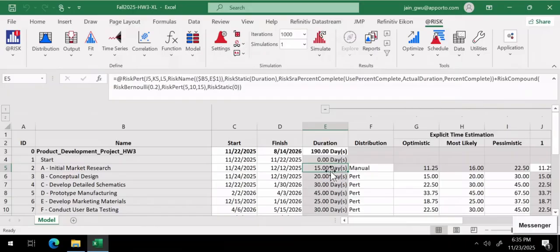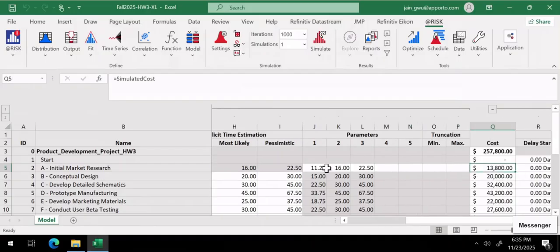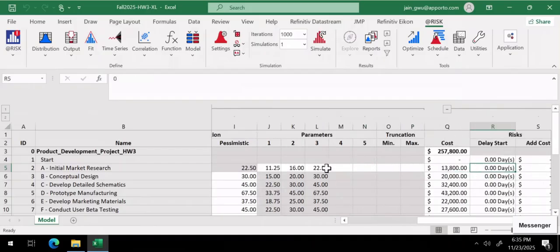This is an extension of the duration. This is different from if the start of the activity was getting delayed for some reason. For example, if there was a risk of funds not being available and the project not getting started on time, we would define that in here. And again, in here we can define the distribution and then add a risk compound distribution with the associated probability of occurrence, as well as the severity, the impact on the duration.